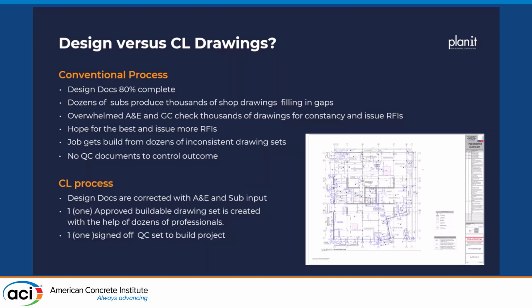And then these drawings typically go to a completely overwhelmed construction administration staff that has maybe 2 designers still left on the project and then a couple of PMs that need to review this. But let's be honest, if we have a stair opening in a high-rise building, I get concrete shop drawings, I get a metal stair drawing, I get a standpipe drawing somewhere. All of those are dimensioned off of different grid lines, off of different information.